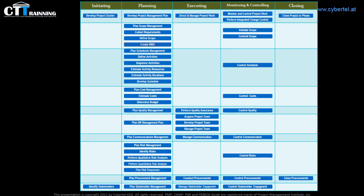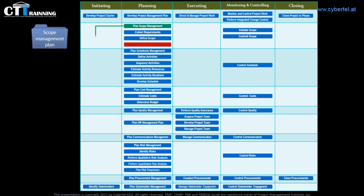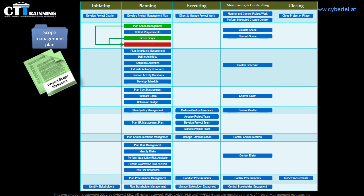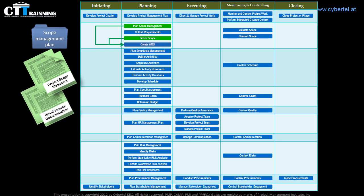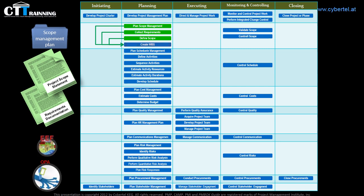Here we arrived at my favorite slide, where we visualize the information. We had five inputs to create the WBS: the scope management plan, which is an output from the plan scope management process; the project scope statement from the process of defining the scope; the requirements documentation from the collect requirements process; and also the enterprise environmental factors and organizational process assets, such as policies, procedures, and templates.